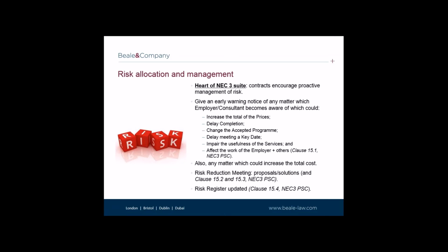The feedback we have had from clients in relation to this regime is generally positive, in that these provisions do to an extent manage risk and reduce the chances of disputes arising. However, what is also clear is that these provisions are administratively demanding. For example, and as I've said, clause 15.1 states that an early warning notice must be given if either party becomes aware of any matter that could increase the total of the prices, delay completion, etc. This has the potential of resulting in a significant number of notices being provided over the course of a project.